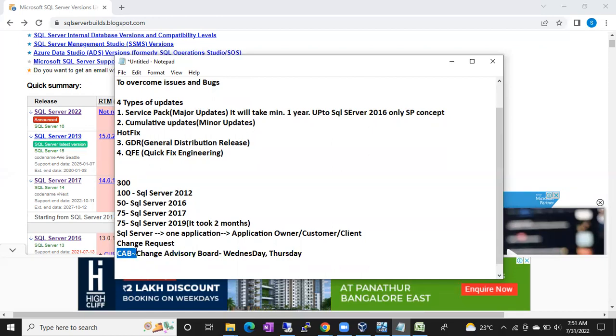They will say, so and so Sairam is planning to patch this SQL Server, and the customer already approved this. Then in the CAB meeting they will ask you, hey Sairam, did you patch the non-prod servers first? Whatever patching you are applying is fine, but did you test it on the non-prod server? Why? Because that patching may give positives and help us fix issues, but not all patchings are good. Sometimes it will create extra problems.